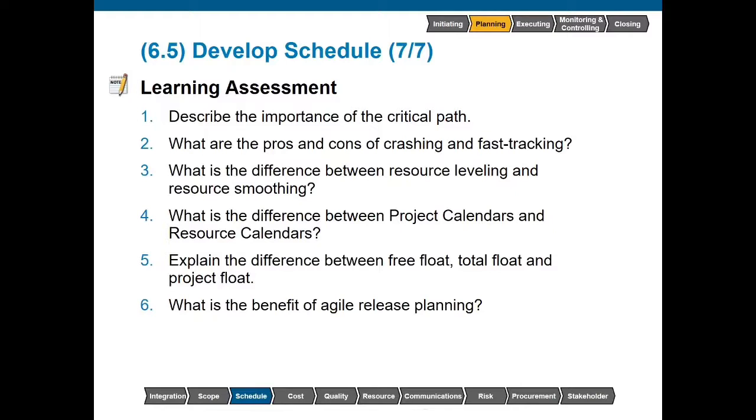What is the benefit of agile release planning? Agile release planning provides a more easily understood project schedule for the customer by defining which features will be available at the end of each iteration.